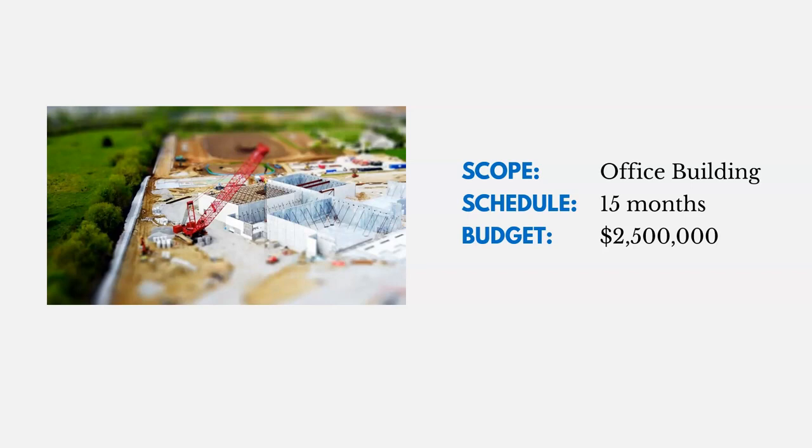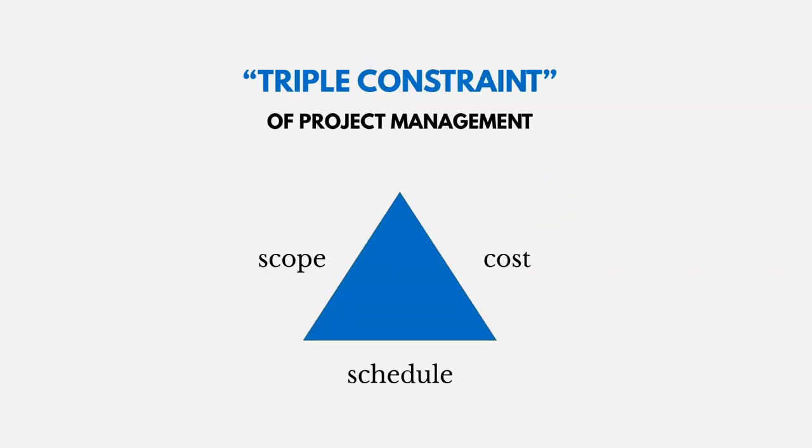Now in project management, we often refer to these three things as the triple constraint of project management: cost, schedule, and scope. So here's an example of why we call it that. So imagine us taking the scope side of the triangle and extending it by adding more work. If you think about the principles of geometry, the sides for cost and schedule have to change too. So if we add scope, we necessarily have to adjust cost and or schedule. And so we're always monitoring these three things to make sure we stay on cost, on schedule, and on scope.